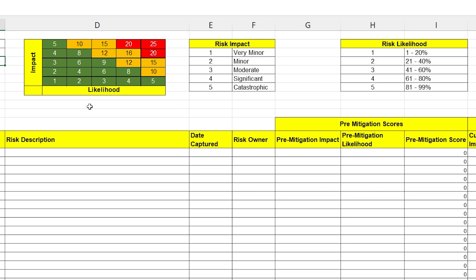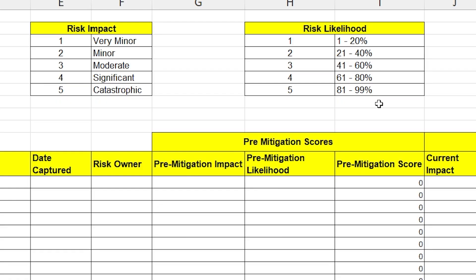I've put very generic titles on here. Feel free to change them as you see fit. You'll see over here the risk likelihood runs up to 99%. Don't forget, if something is 100% likely, it's an issue, not a risk.